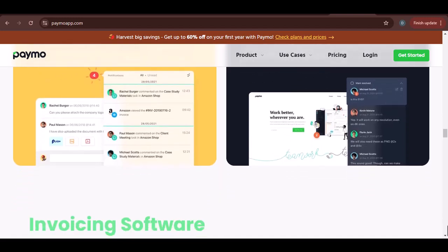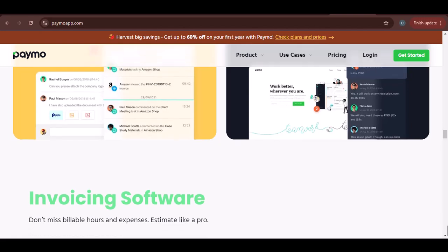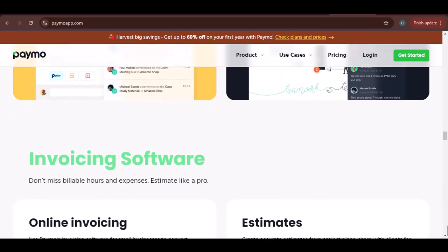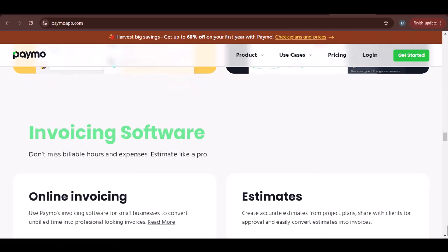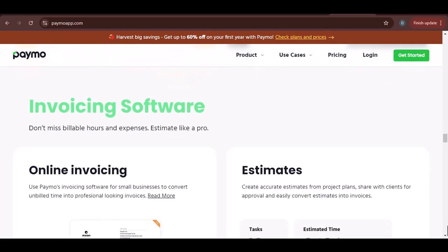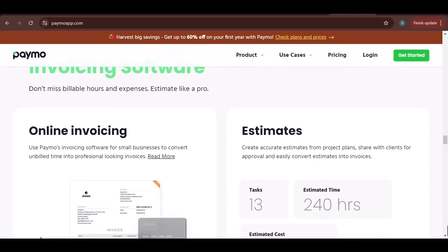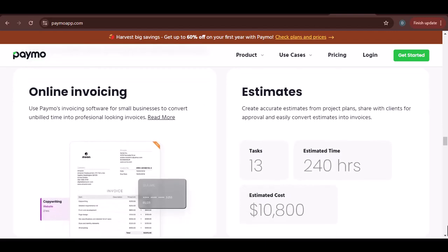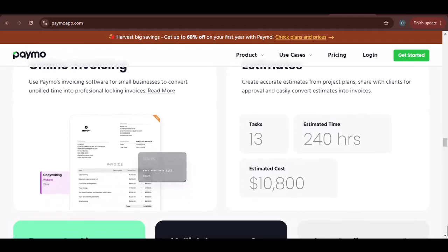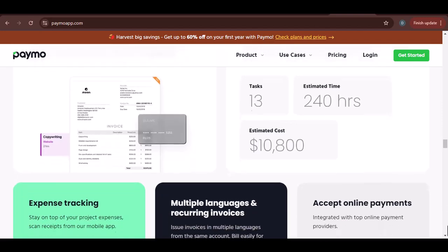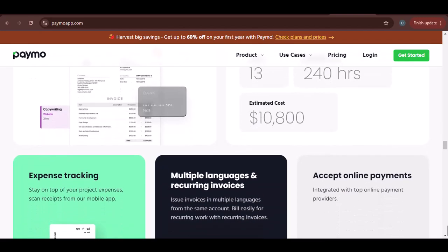Step 4. Setting up milestones. Milestones are important checkpoints throughout your project. They help you measure progress and ensure the project stays on track. Create milestone. Click the Add Milestone button and enter the milestone's name and due date. Assign tasks. Associate relevant tasks with the milestone.